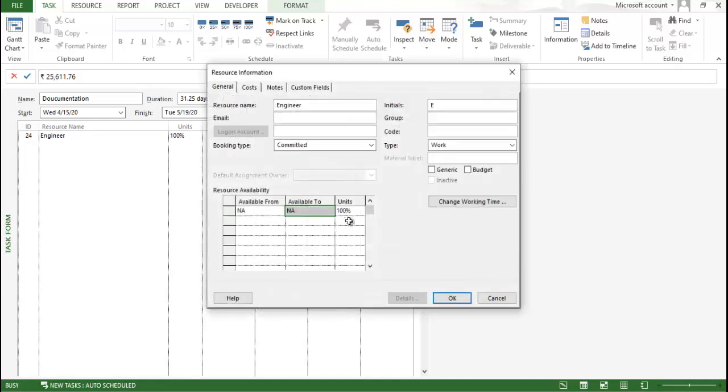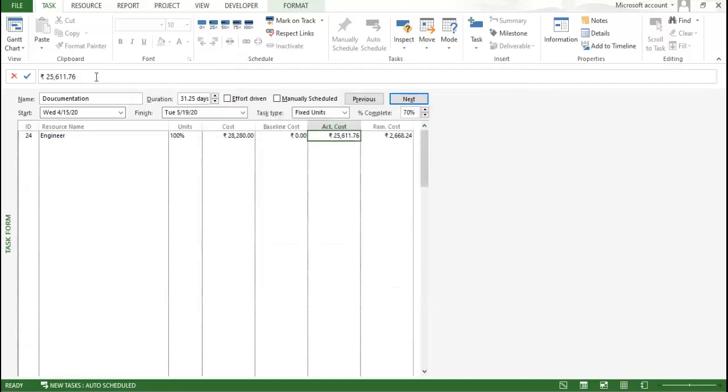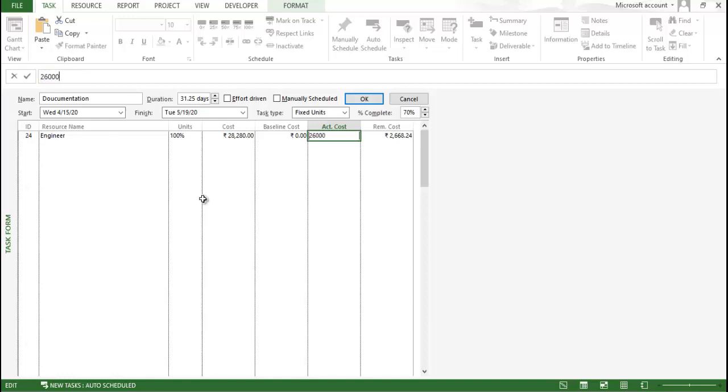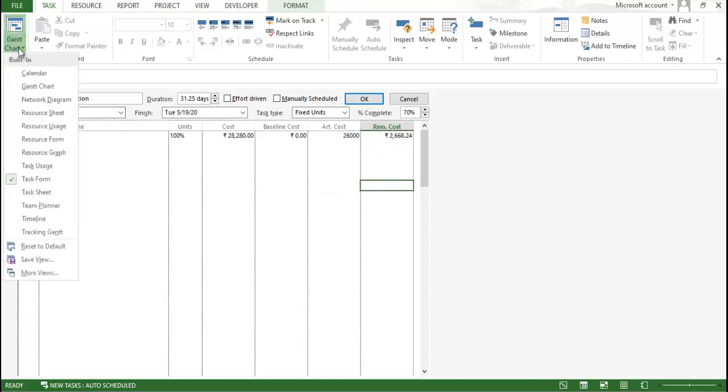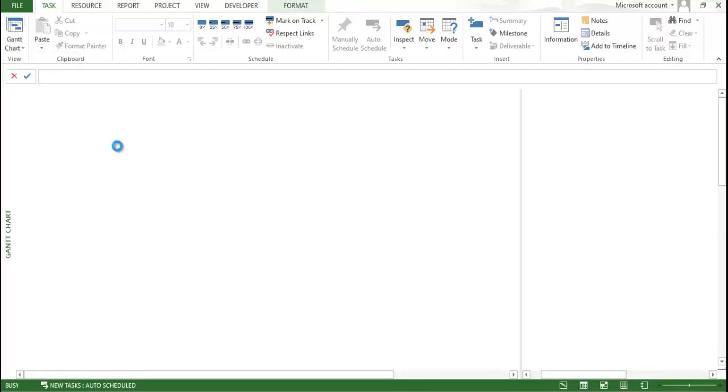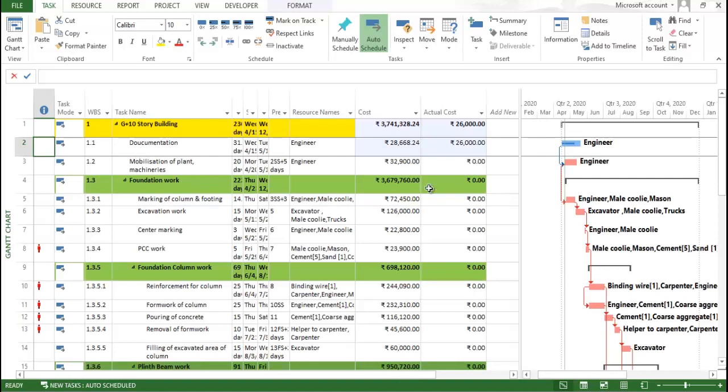And now I can edit the cost over here. You can see I can edit the cost. So, now I think I want like 26,000 what I incurred. So, just put here, based on that my remaining cost will be calculated. Now, if I go to this particular Gantt chart, you can see the 26,000 over here.